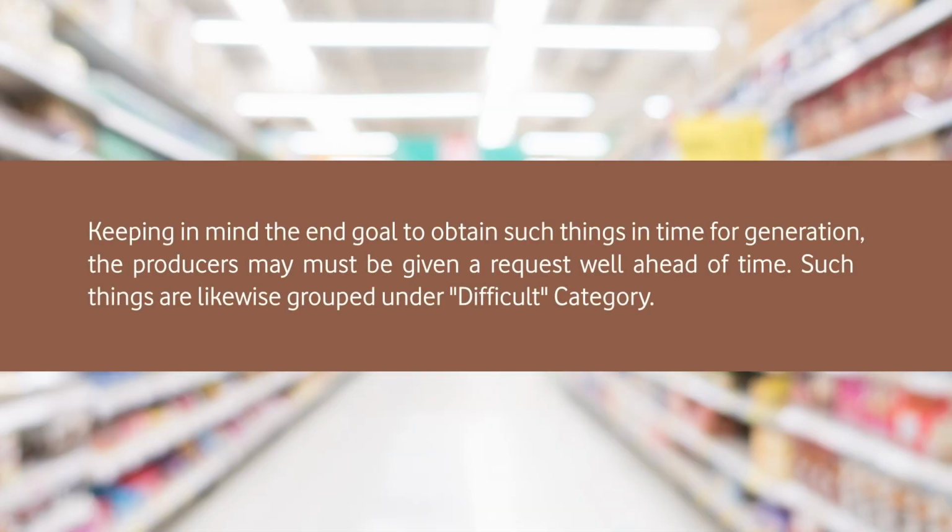So we have to give the manufacturers or vendors much more time to procure these items. Keeping in mind the end goal to operate such things in the time of generation, the producers must give a request well ahead of time. Such things are likewise grouped under the difficult category.